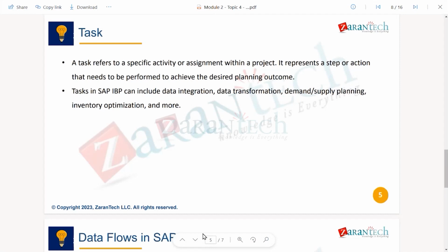Now, what is the task? As a part of project management, there are wide-level milestones defined at periodic intervals. These milestones are nothing but the specific activities which a project management team needs to complete within a stipulated time. For example, they prepare a project timeline wherein the various activities, even the smallest level of activities, are mapped as a part of the project charter.